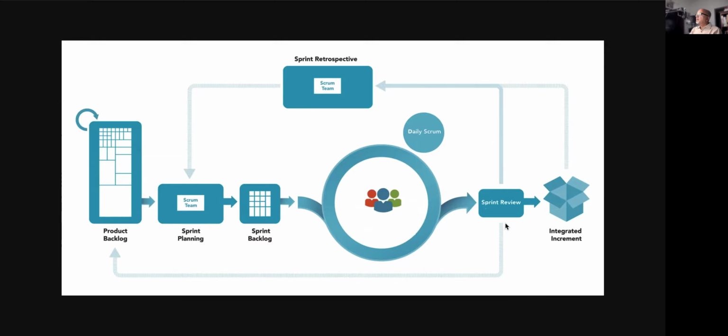And then we have a sprint review. The product increment gets reviewed. After that, the team gets into a sprint retrospective to analyze what all things they did right and what all things can be done better. With that learning, they get into the next sprint planning meeting.